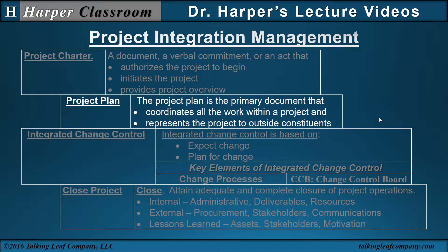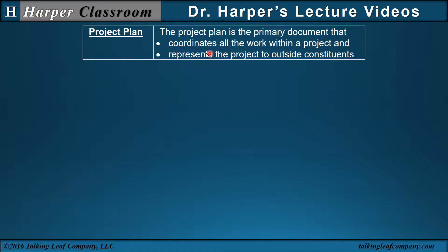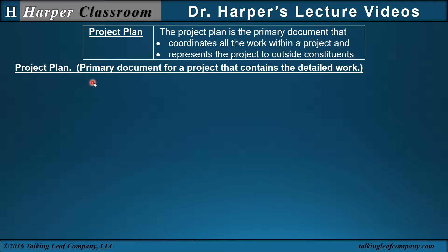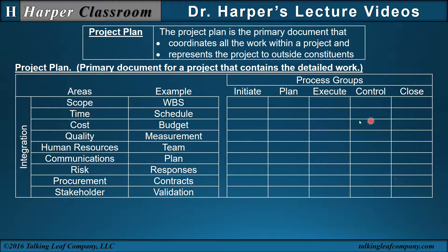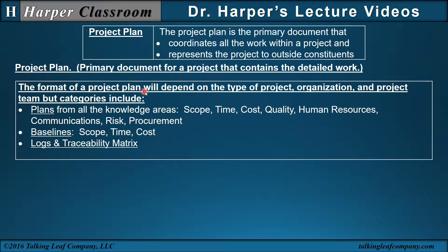The next process is the project plan. The project plan is the primary document that coordinates all the work within a project and represents the project to outside constituents. Not all resources are used on every project — those appropriate for the project are selected by the project manager and project team and go into the project plan. The format depends on the type of project, organization, and project team, but categories include plans from all knowledge areas: scope plan, time plan (schedule), cost plan (budget), quality plan, human resources, communications, risk, and procurement.